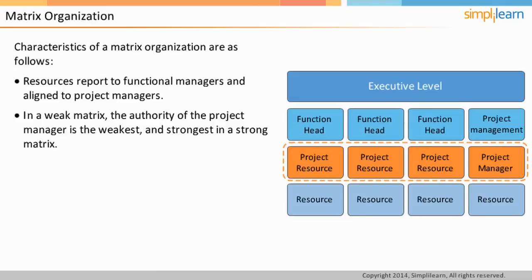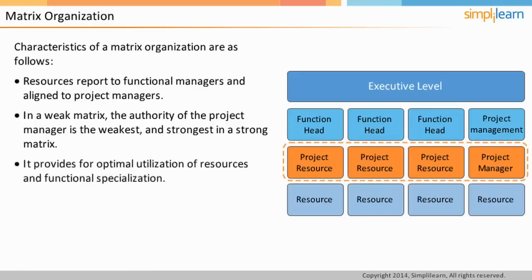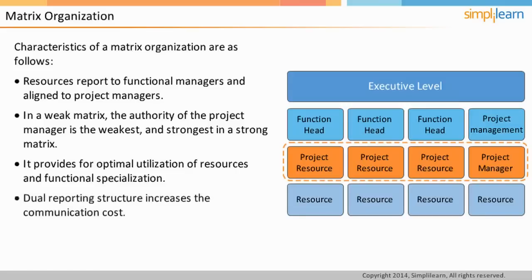They would be called project managers in a balanced or strong matrix structure and have slightly more authority over the time of team members. The advantage of the matrix structure is that resources can be optimally utilized while preserving the capacity of the project managers to get projects executed efficiently. Resources can specialize in their functions and have stability in their careers while also contributing to projects. The disadvantage of matrix organization is that the communication overhead increases significantly due to the dual reporting structure.